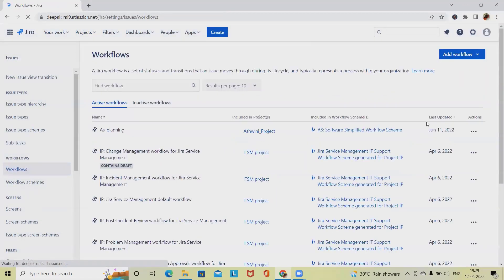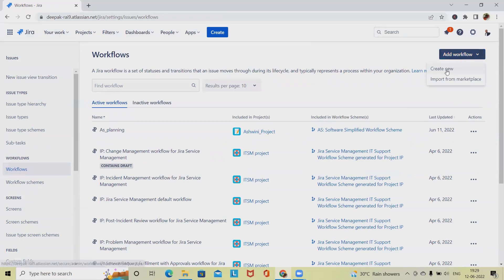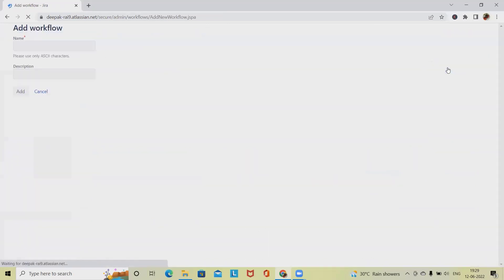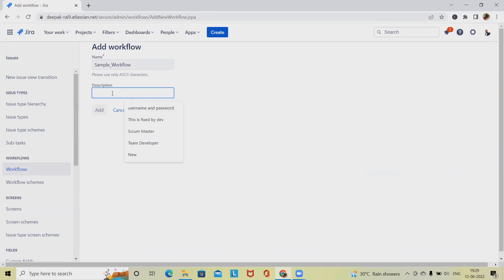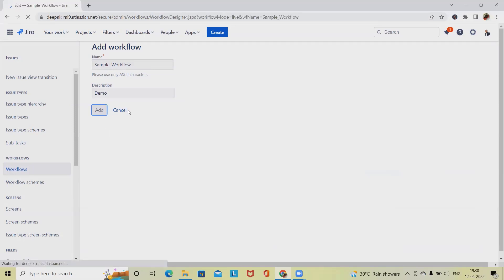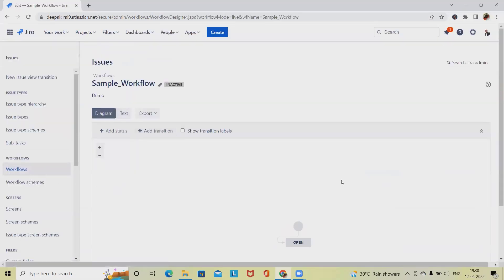Click on the diagram view and you can see a nicely created workflow that you can edit accordingly. If you want to create a new workflow, click on Add Workflow and then click Create a New Workflow. For creating a new workflow we have to define the name — right now I am giving it as 'sample workflow'. In the description field, add a description about this workflow. I am creating this for demo purposes. Click on Add and the workflow diagram will be generated.